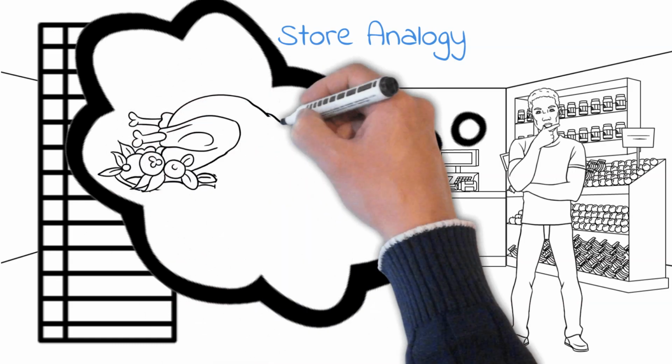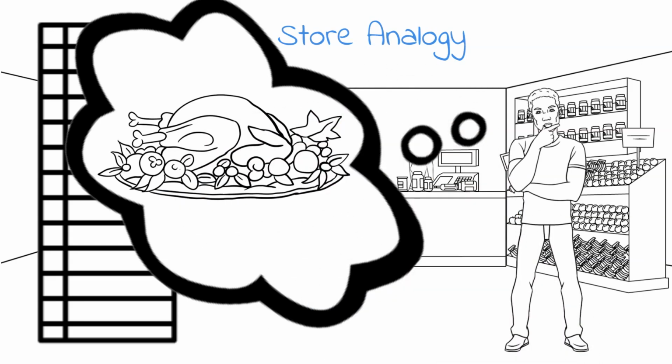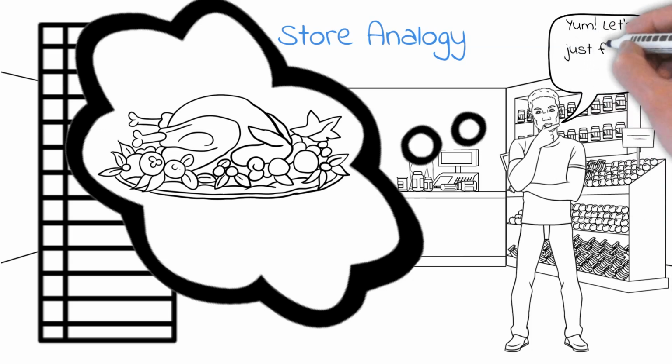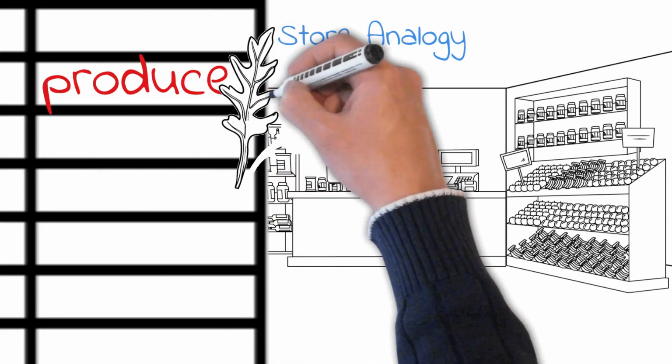If we've based a timeline or a budget off of the things we're supposed to build, anything else that they ask for is going to add extra time, add extra money, and we're no longer going to be able to live up to those expectations that we set based off of that original scope. So we can see when there's going to be those adds, when there's going to be those extra things coming in, and allows us to say, okay, well, I'm doing my grocery store run.